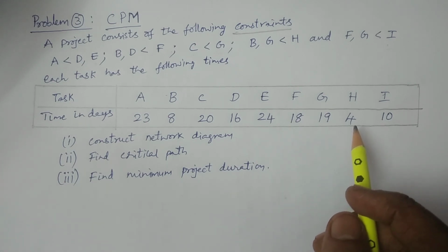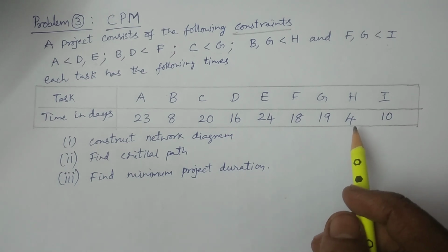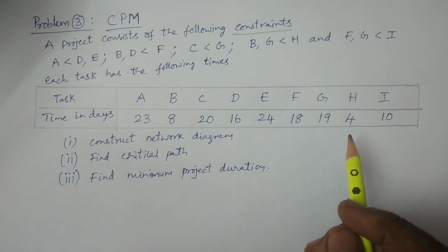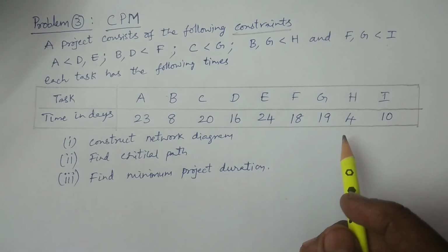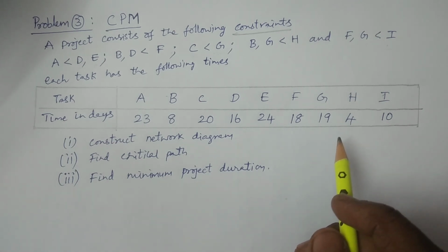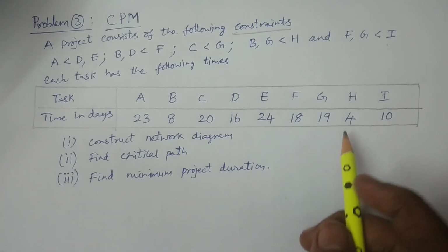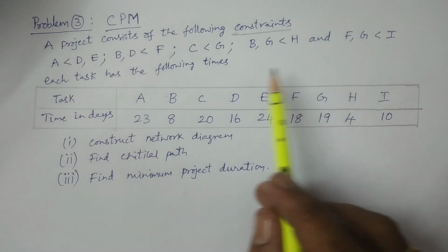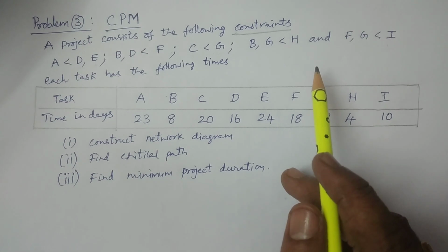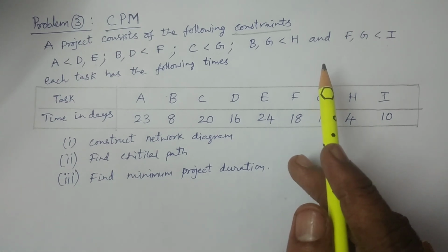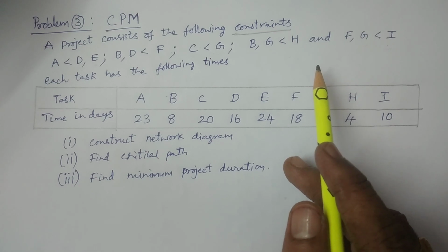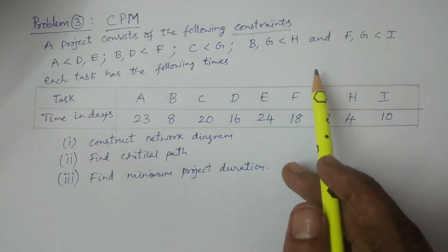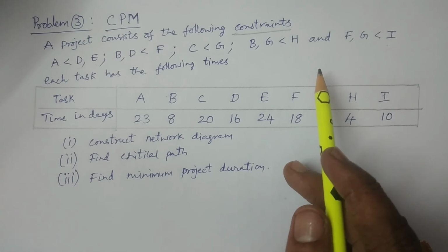That means, for which activities there are no predecessors. That is, there is no other activity before that particular activity; these are called starting activities. There is no such formal terminology, but you consider it so. Then among these relations, you also find the activities having no other activities after them, which means end activities, the last activities.